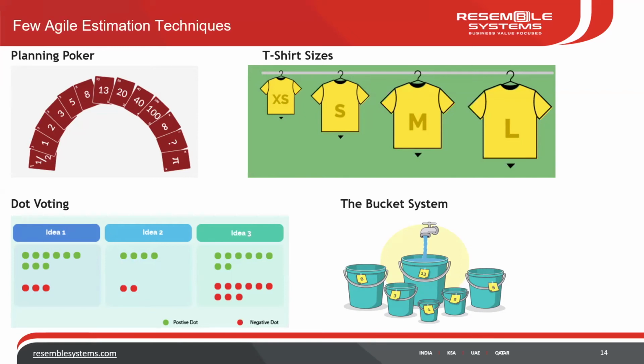And like that, he has a lot of user stories written, and he sticks them to the board or keeps them on the table. And then he says, okay, for this user story, how long do you think the team needs to finish it? So the team selects a card. Especially if you see the numbers here, it says 1. Forget about the half. It says 1, 2, 3, 5, and 8.